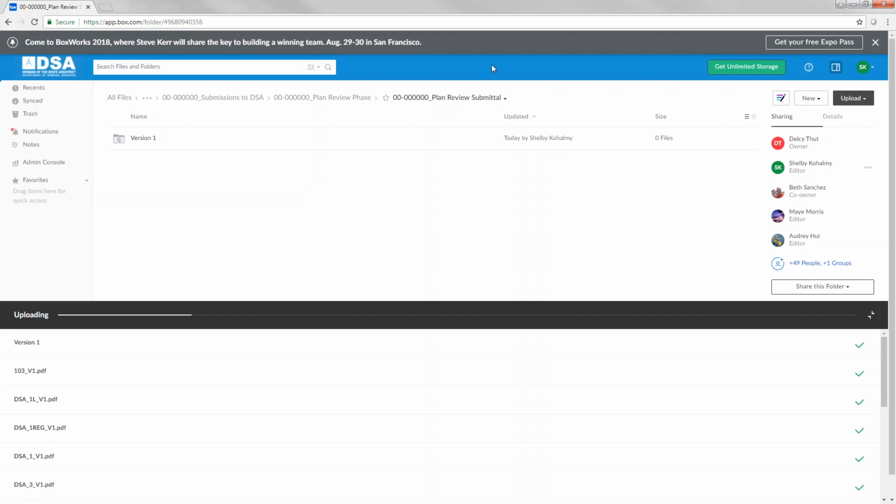All subsequent document submittals will be uploaded to Bluebeam Studio Projects, Submissions folder. If the submittal is determined incomplete by the Phase 1 review, DSA will send an email notification with instructions requiring document resubmittal.